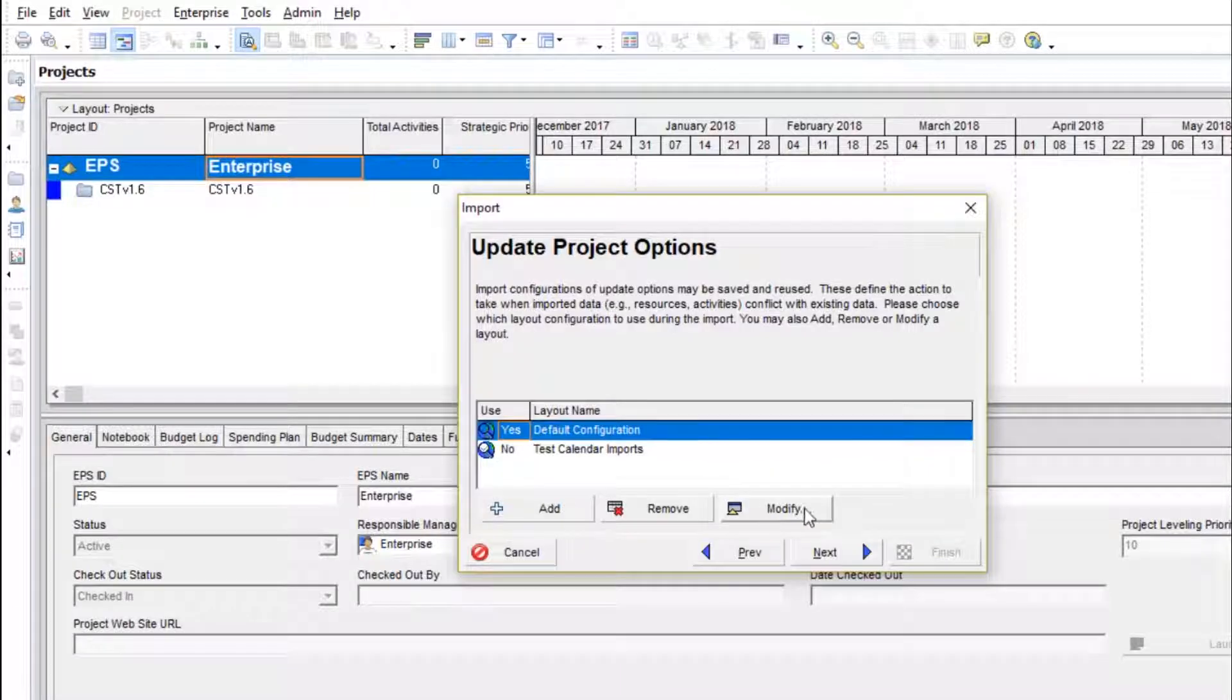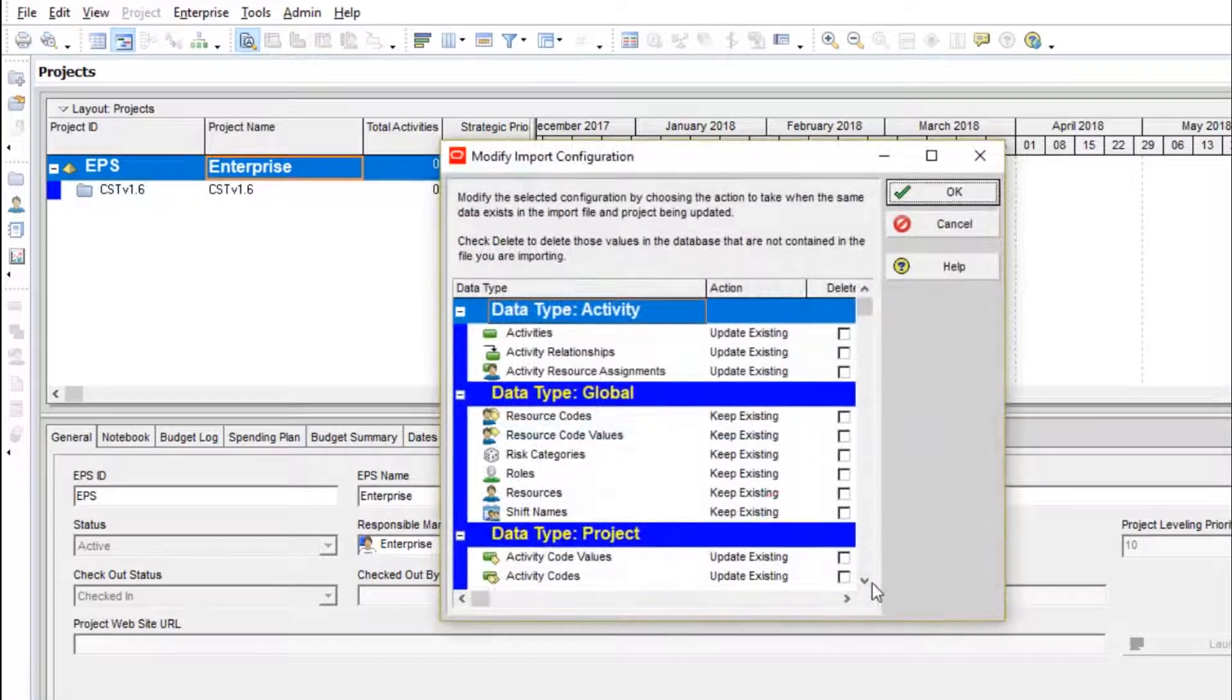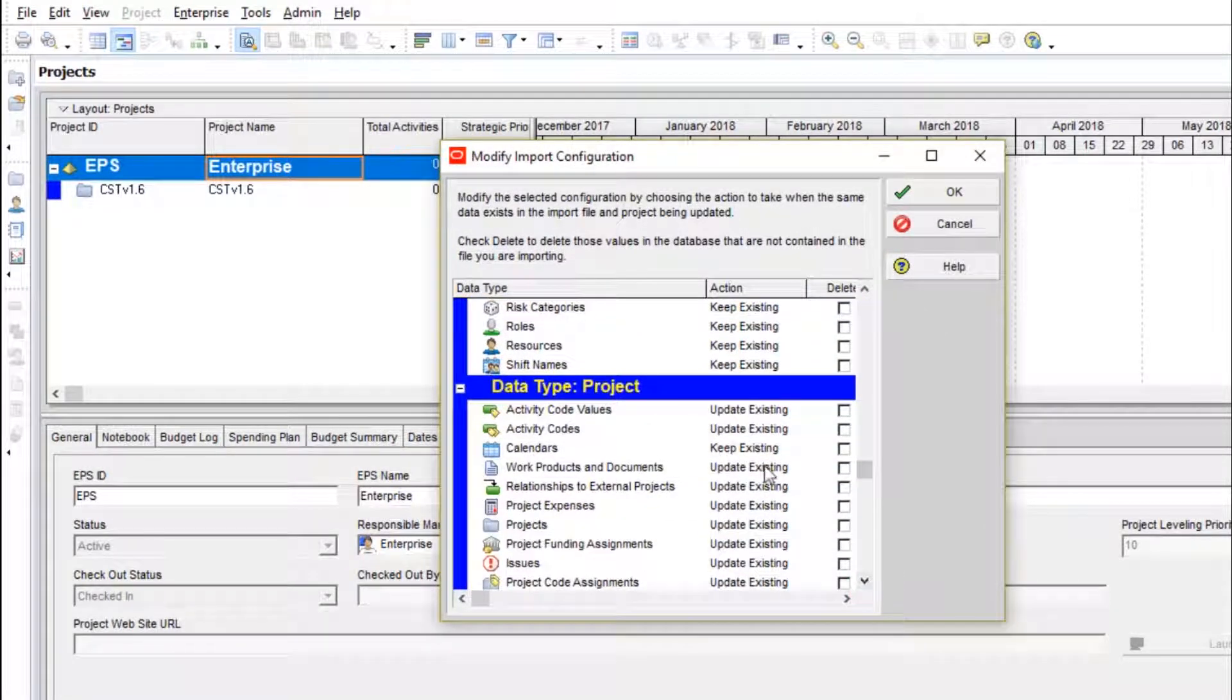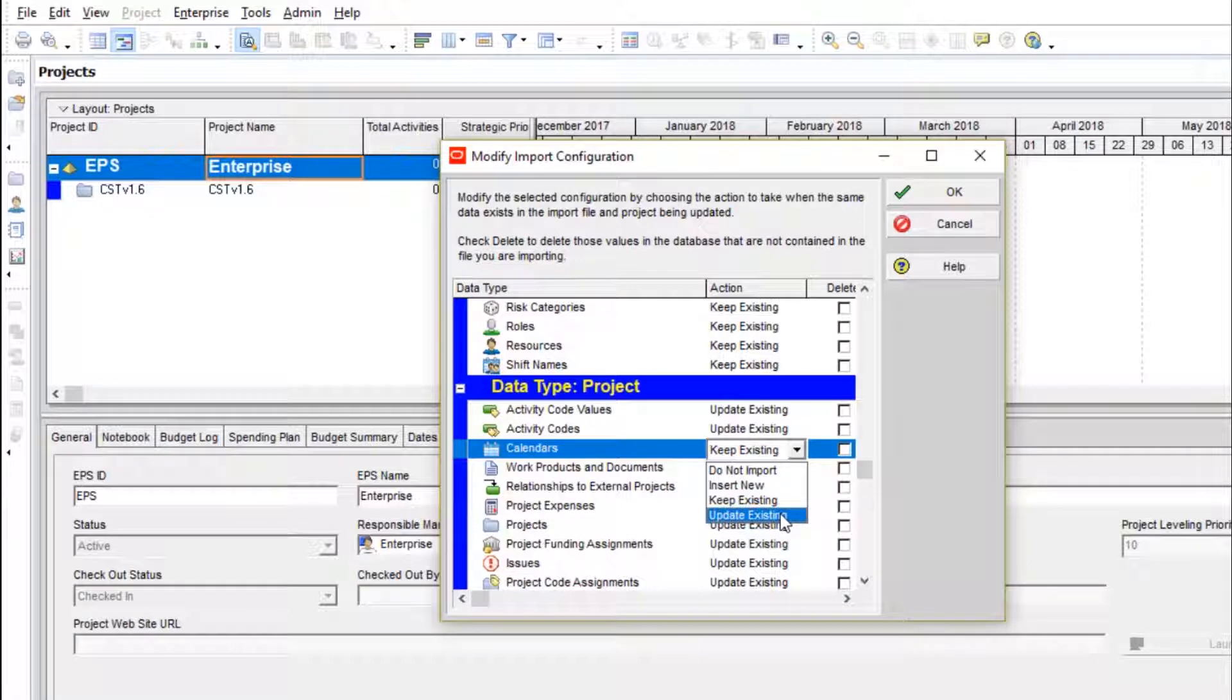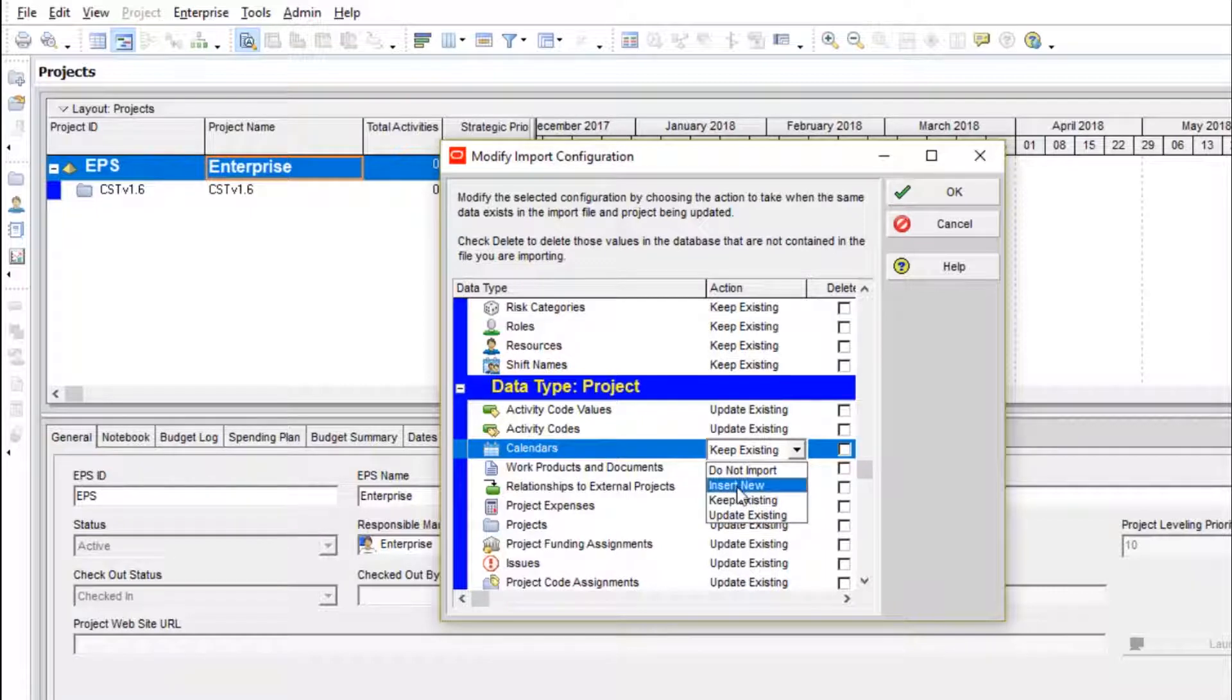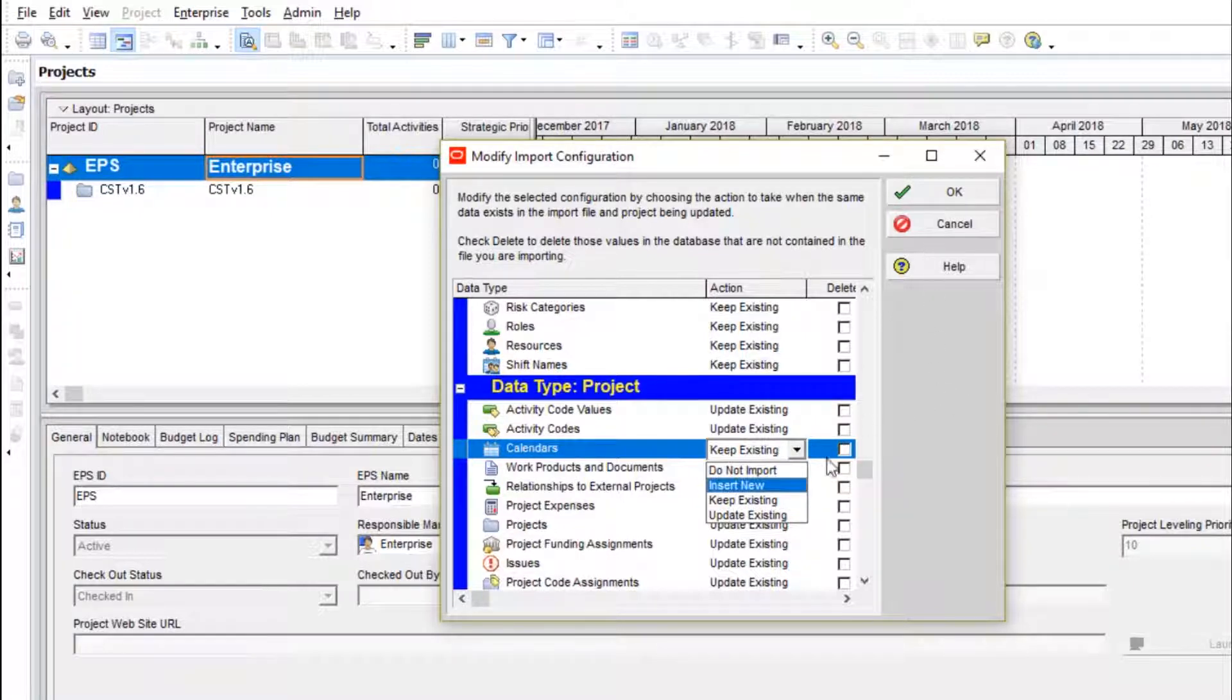Let's take a look at the default configuration here by clicking modify. We go down to calendars. You can see it defaults to keep existing, which will keep our existing global calendars. Updating existing would be the option to overwrite our global calendars with the ones incoming from the XER schedule file. And insert new would just make a new copy of the incoming calendars while keeping our existing global calendars. So we're going to stick with the default of keep existing.